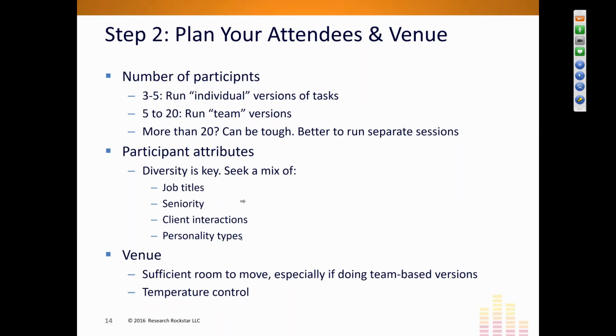Today I'm giving you 2 brainstorming exercises, both of which I've used many times specifically for questionnaire planning. And one of the things I really like about both of these exercises is that they are easy to run either with individual participation or with teams. What you'll see when I present these exercises is that there are certain parts that you can either have people as individuals in the meeting conduct, or break them into groups or teams and have teams work together. In general, I find that if you have more than 20 people, brainstorming can be tough, and at that point you might want to consider either prioritizing who's going to be in that meeting or perhaps breaking it into separate sessions.